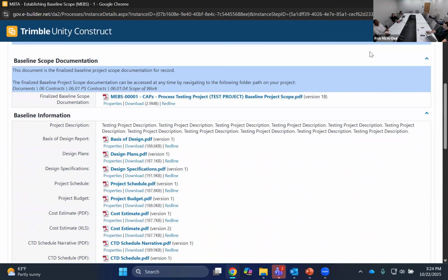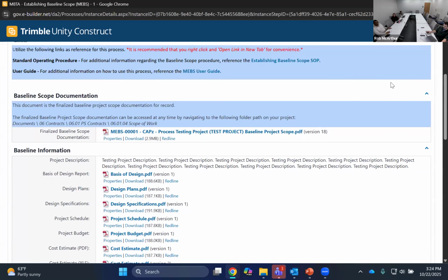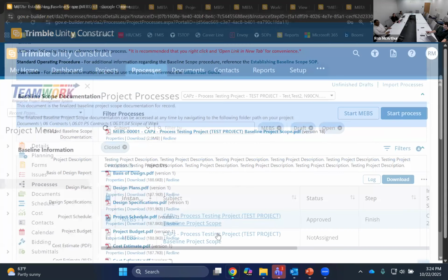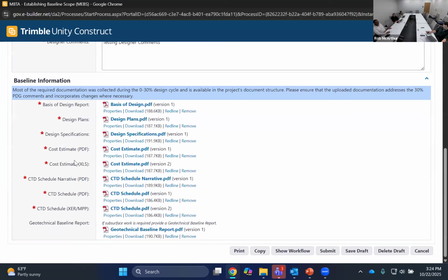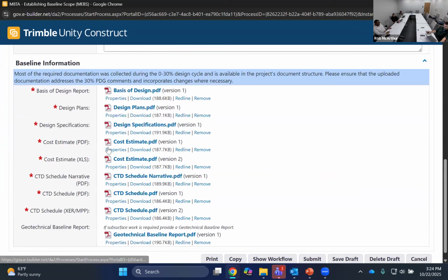And before we move over to the scope change control process, Courtney would like to add some information. Yeah, where we are asking for the budget, that is the full project budget that we're looking for. The estimate is really the 30% construction estimate. But the budget would be the full project budget to include design costs, and all soft costs, as well as the construction estimate. Just want to make that distinction. Thank you.